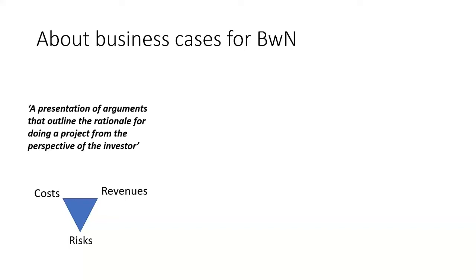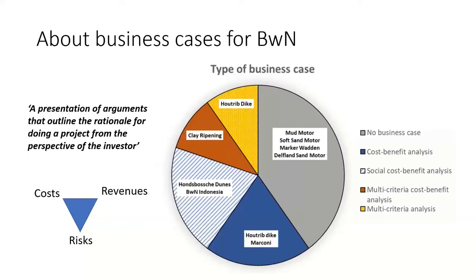And in our analysis, we looked at the EcoShape pilot projects. And you see that here on the right, what type of tools they use. What was striking, that actually 4 of the projects did not use a business case or did not need a business case to convince the financiers. So here you see that it's not always necessary to have a business case at the start of a project.